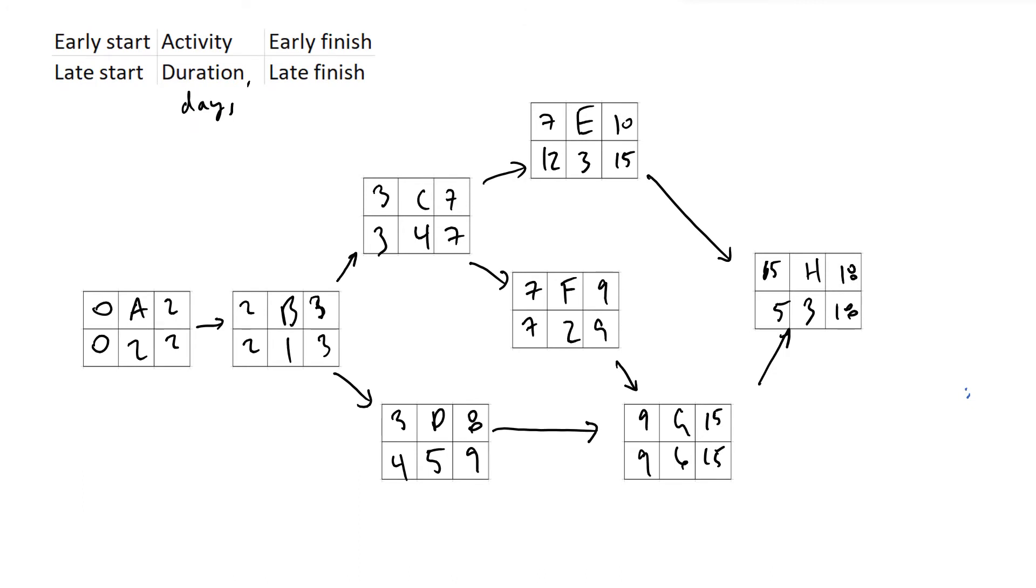And then finally what we ended up with is our network schedule diagram. From this, we were able to determine our critical path by looking at which activities on this diagram had late finish and early finish dates that were equivalent, and early start and late start dates that were equivalent.